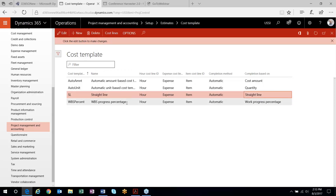Within D365 projects, you have the ability to set up a work breakdown structure on your project where you can set up all the tasks that need to be completed with the durations you want them completed in. You put an estimate of the effort onto those tasks to build up what your estimate looks like, and then the system, based on the percentage completion in the work breakdown structure, pulls that percentage into your revenue recognition calculation.